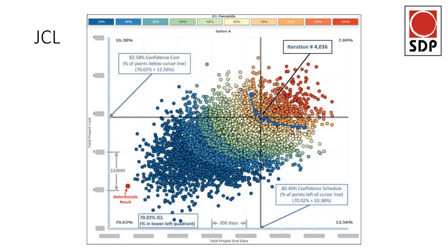So in terms of fidelity, let's use a mining job. In engineering, they're going to introduce a specific new piece of technology, like a new PLC. First question from my side as a risk guy: where's this been used before? Where's the reference site? Oh no, it's a pilot, it's brand new, just came out. I say, well, my friend, that is so uncertain. So then I will map that down in terms of a schedule, literally down to maybe even a level 4, because I need to account for that risk and the effect of that uncertainty on my schedule or duration. At the end of the day, level 2 works for most instances.